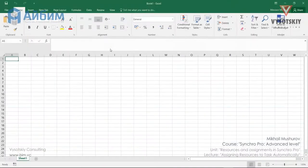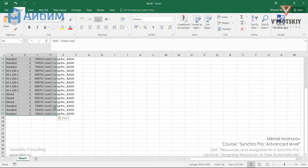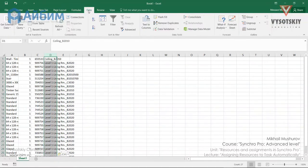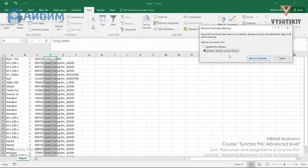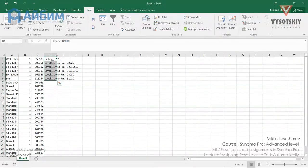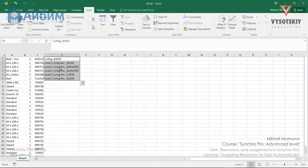Now we can copy the resources with VBS codes from the resources table. Copy as text. Open Excel. And paste the menu table. Now we can remove all duplicates from the D column. You can see now that the 6 activities are missing from our work schedule. So we can create a report to a planning team.